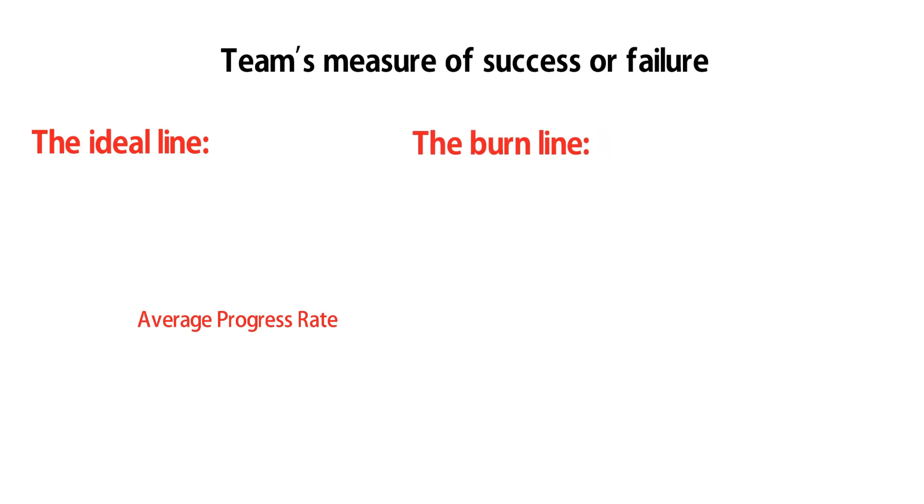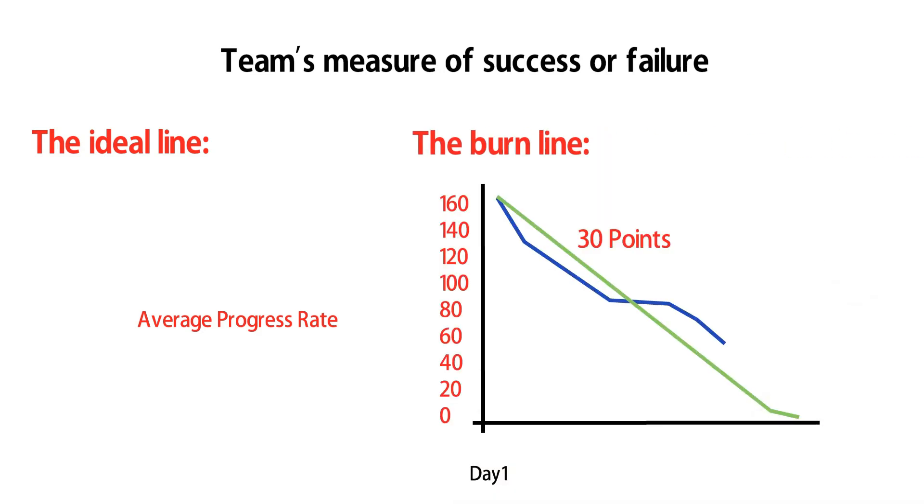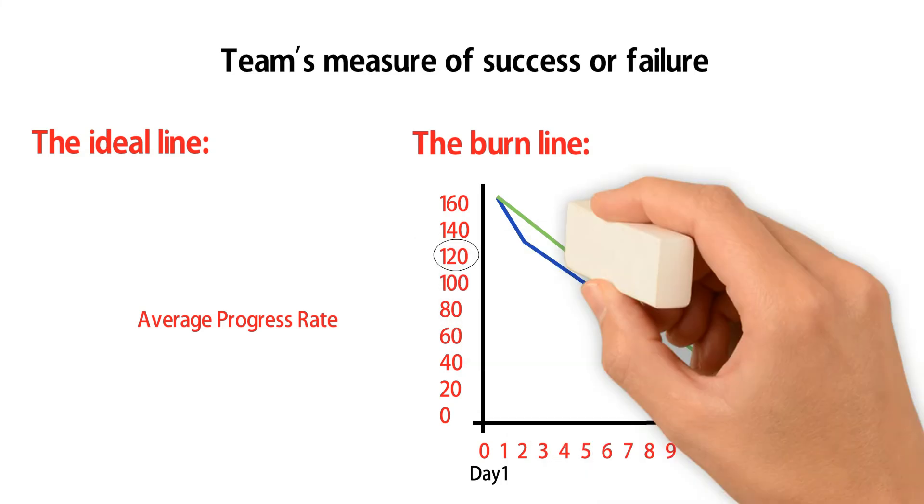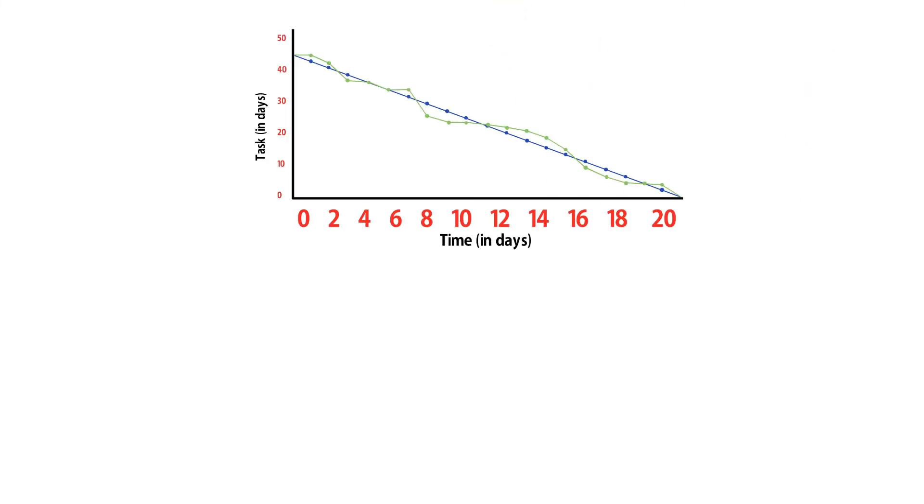The burn line tracks actual progress. 30 points of user stories completed on day 1 with 120 left undone. 40 user points completed after day 2, leaving 110 undone. You can figure out if the team is lagging behind or ahead by viewing the chart.